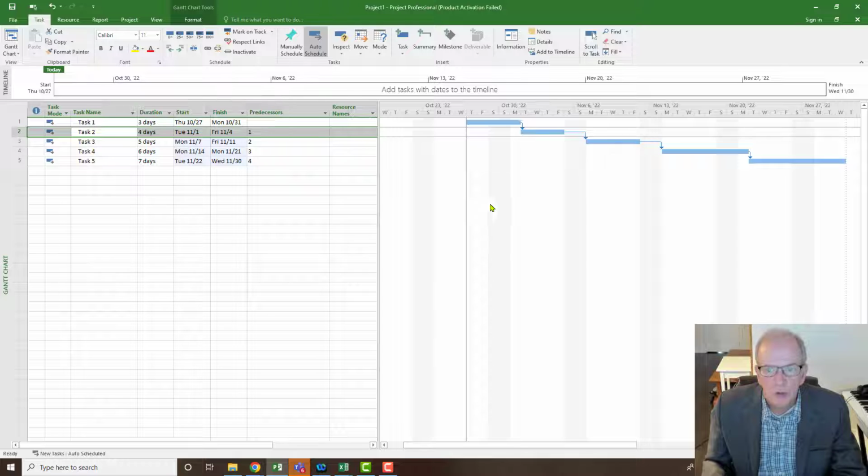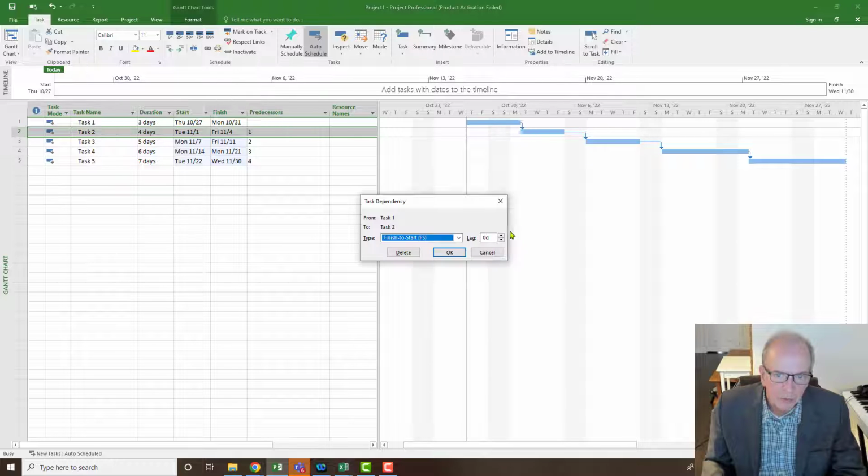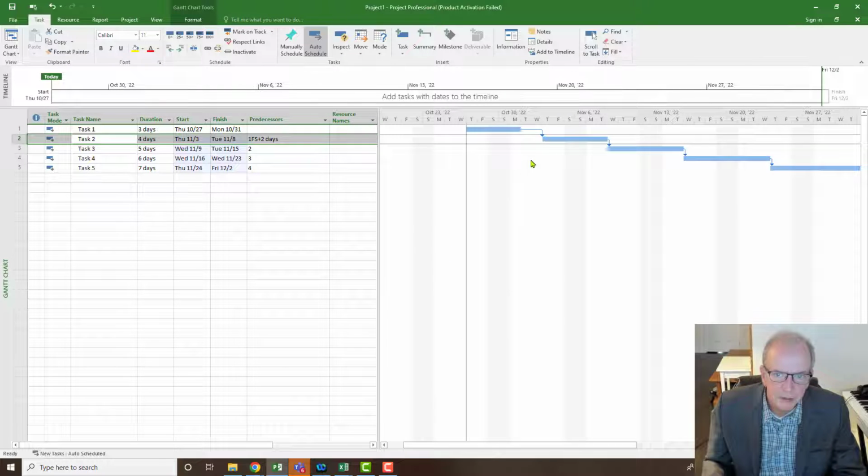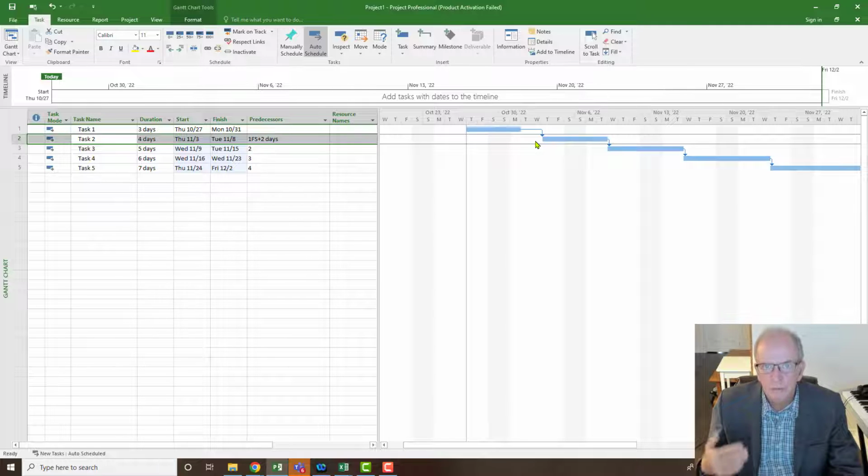All right, so if I want to put a lag time on something, as I said, I can just go to that line, double click, and say, all right, give me a 2-day lag. If I click OK, watch what happens. That advances that 2 days. So it's allowing me to wait. It's allowing a wait period. In construction, maybe you want to have the tile dry before you grout it, or maybe you want the concrete to cure before you actually start stripping the forms. So there's a whole bunch of reasons why you might do that.